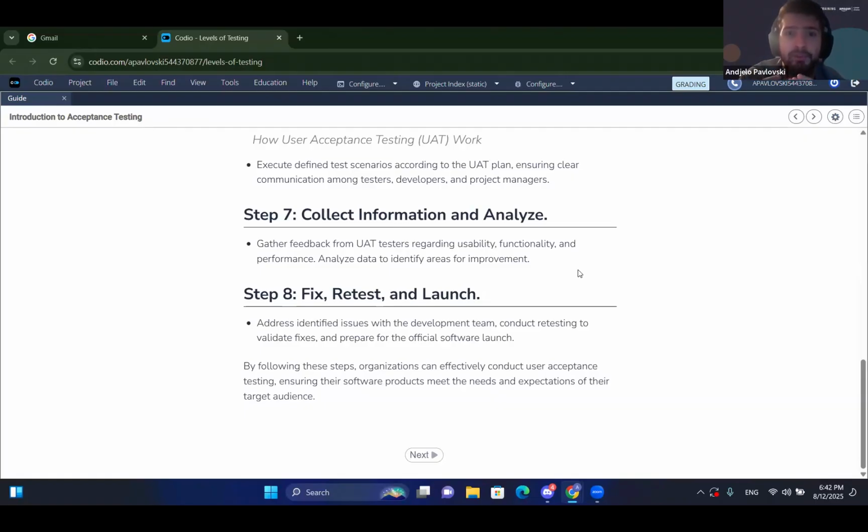without combining them and adding them to a structured document. So I would also give a tip: whenever you do this type of user acceptance testing and you are the lead in this process as a QA, always make sure to provide a template document where you would want people to add everything that they have discovered, and have it as structured as possible so that it's easier for both you and the development team to take a look at what has been tested, what the steps were, and what needs to be modified. Having a good way of collecting and structuring the information is key so that you don't get into a scenario where you can't even remember if you've collected and covered all scenarios.